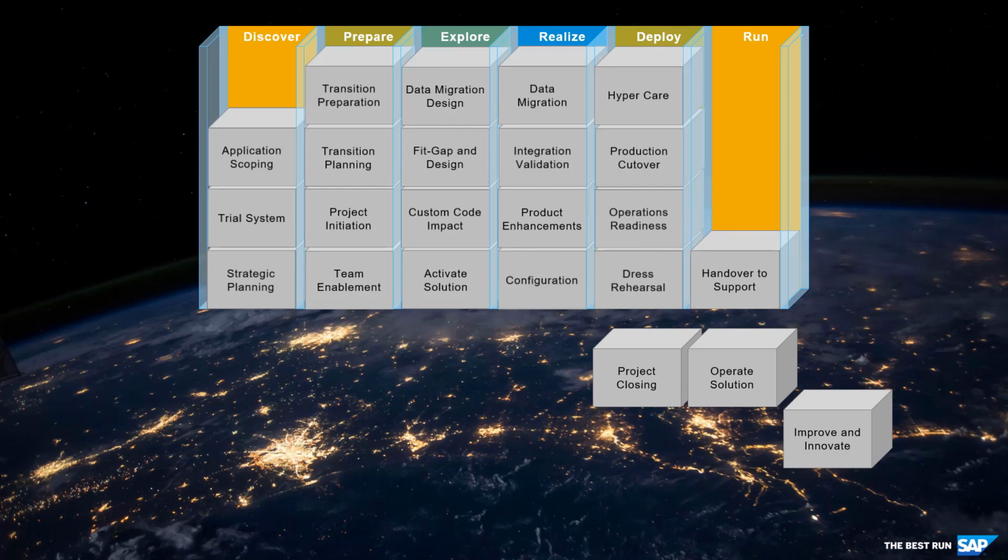Once the hypercare phase has ended, it is important to fully enable the regular support organization at the customer side to safely and securely operate the new system. The handover to support includes the finalization of the system documentation and the operations handbook with descriptions of all operational procedures. This can be supported by SAP with the handover to support scope option as part of the build execution service.